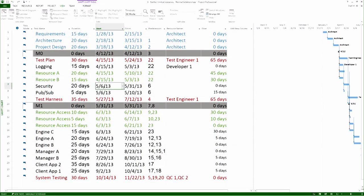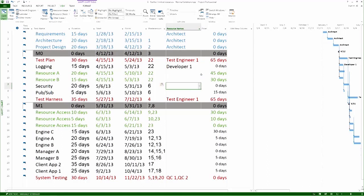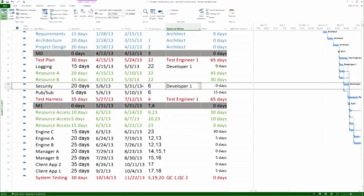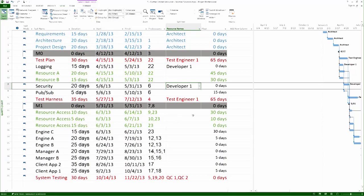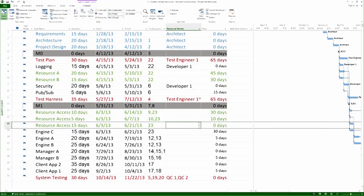And indeed, on 5.6, we see two activities. One with zero days of float. One with 15 days of float. Obviously, we're going to assign it to the zero days of float. Because we do float-based assignment. The developer is popping back on the network on 5.31. The following Monday is 6.3. Again, we look for activities around 6.3. It has the least amount of float. And it's obviously going to be this one.